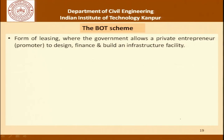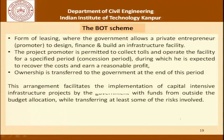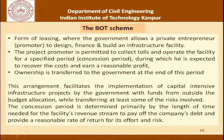BOT is a form of leasing where the government allows a private entrepreneur to design, finance, and build an infrastructure facility. The project promoter is permitted to collect tolls or operate the facility for a specified concession period, during which costs are recovered and a reasonable profit earned. Ownership is transferred to the government at the end of this period. This arrangement facilitates capital-intensive infrastructure projects using funds outside the government budget while transferring at least some of the risks. The concession period is determined primarily by the length of time needed for the facility's revenue stream to pay off the company's debt and provide a reasonable return on investment.